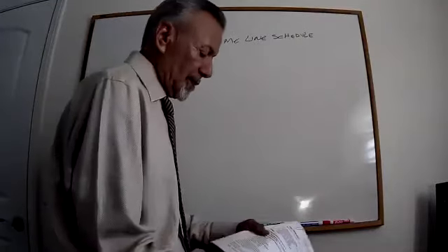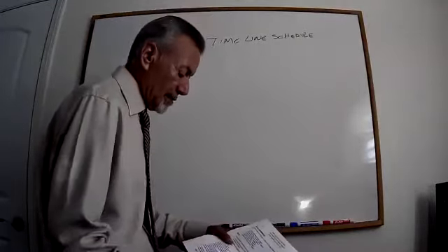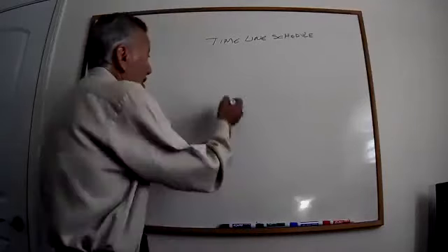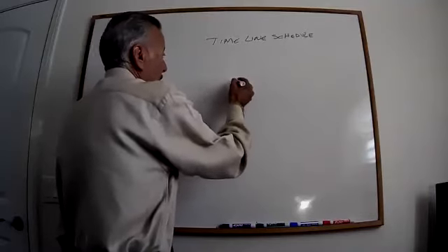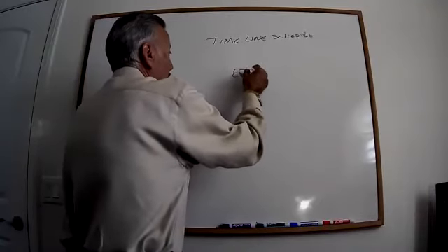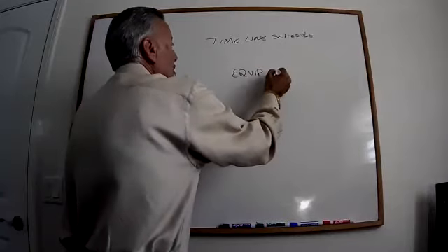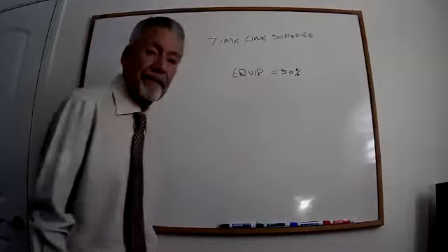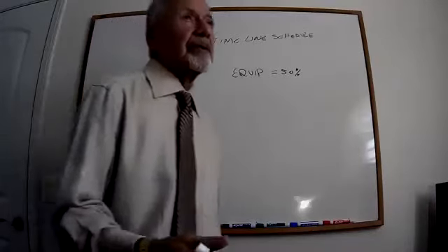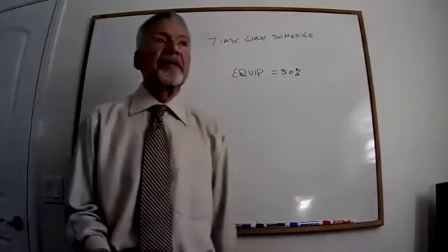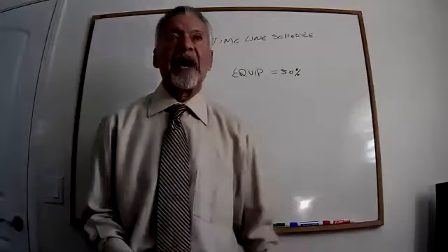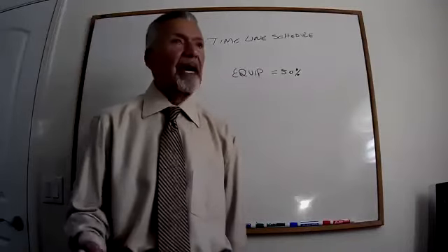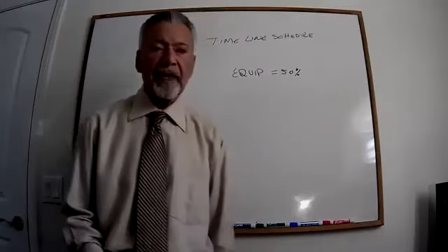I gave you some equations, if you look at it, for what would be the assumptions for the cost. First thing is the equipment. The equipment is 50% of your total cost. So let's say you find out you need 200 big, large panels, and each panel costs, I don't know, $100.